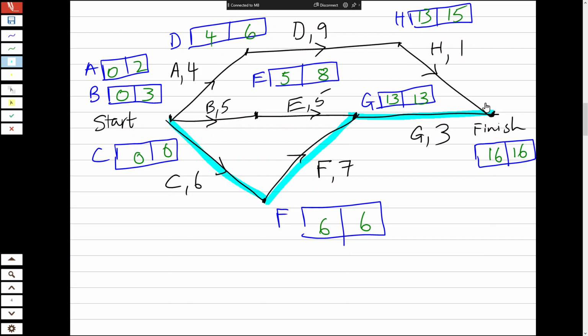So if I is 14 and we need to finish H and I at the same time, we would need to start H the day after we start I. So delay H by 1.